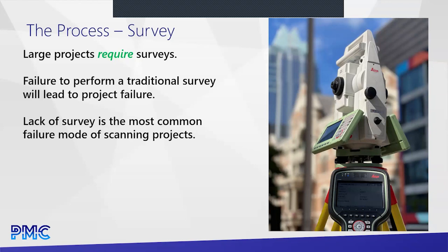when we get to that section. Smaller projects, like I say, require no targets at all. Larger projects start to require targets. Very large projects require survey. If you don't do survey on very large projects, your data quality will not be acceptable.